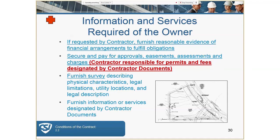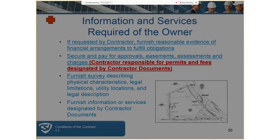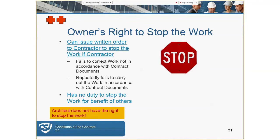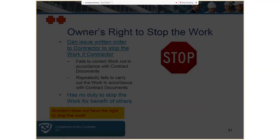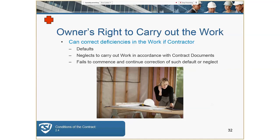The contractor would be responsible for building inspection fees. The owner has the right to stop work — not the architect. The architect does not have the right to stop work. The general contractor may stop work for non-payment. If you see something being built wrong, you cannot tell the contractor to stop. What's recommended is to say: if you continue to build it that way, it will be rejected. Keep an open dialogue with the owner about issues observed.